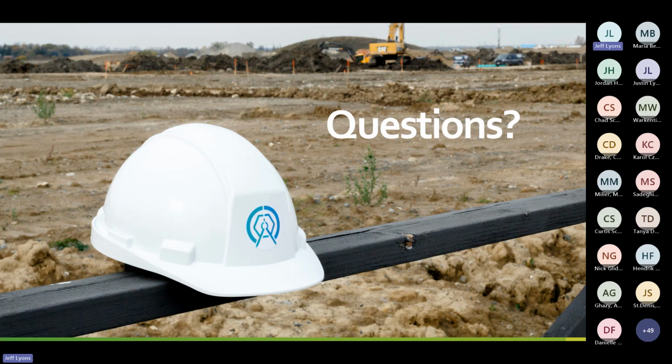So there's lots of little things like that, or project types. Quantity comparisons, don't compare any other area of granular, plus or minus 5 tons from this tonnage, things of that nature. So it's a very elaborate estimating system that you can configure. Okay, thanks.